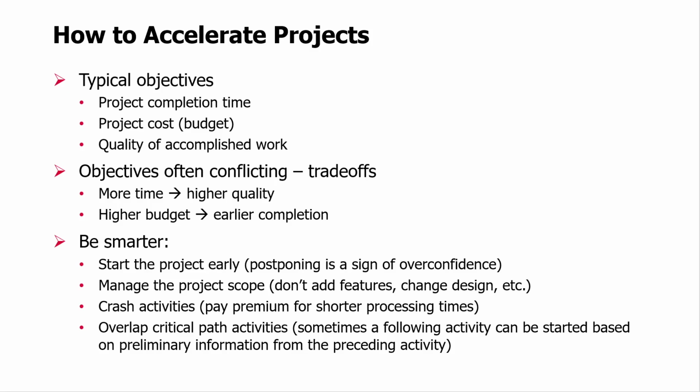And of course, remember to overlap activities, right, whenever we can. Sometimes, surprisingly, critical path activities might be overlapped. For example, you might be able to start a successor activity with some preliminary information from the preceding activity and thereby speed it up.